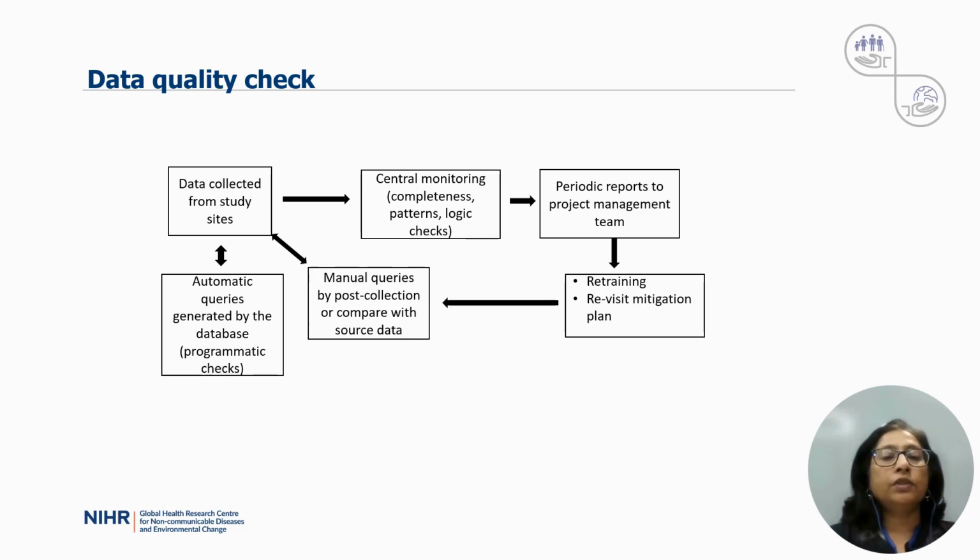The third method, which is most efficient but needs skilled people to do it, is central monitoring. As I said, you can take the data outside the electronic data capture software and use a software to look at completeness, patterns, and logic checks. So you can see there are three different ways we have done.